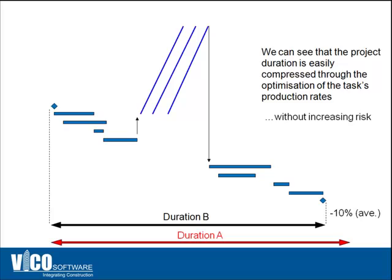With this you can also increase the level of detail of the schedule because you can include more information in the schedule without actually increasing risk. By using this additional dimension, locations together with productivity, you have the ability to optimize the schedule and compress it by at least 10 percent on an average basis.